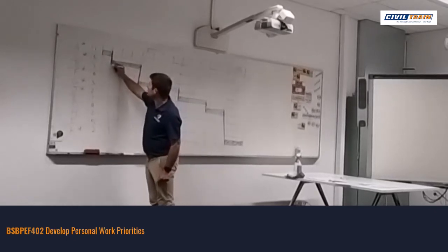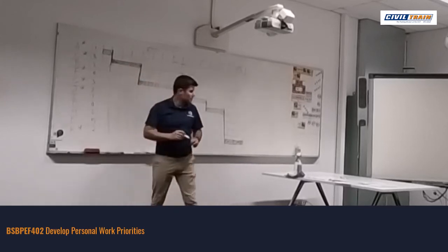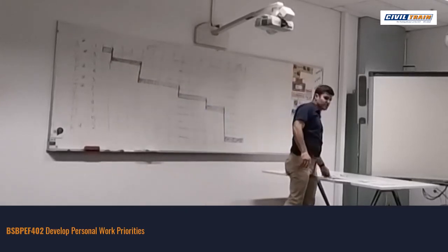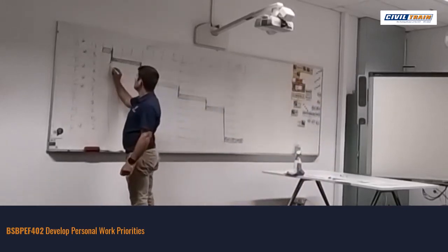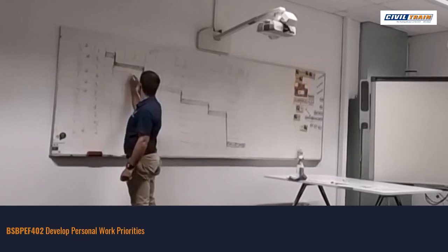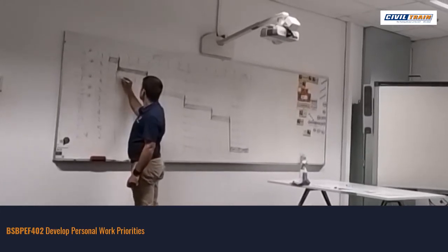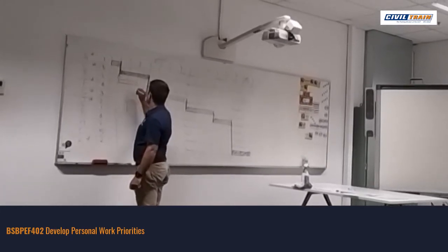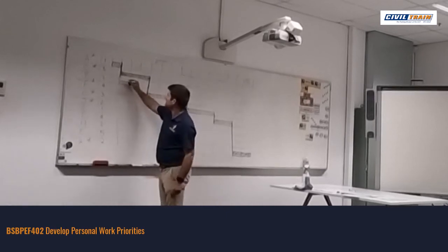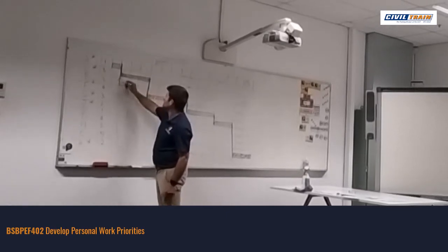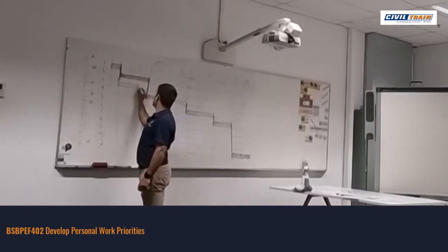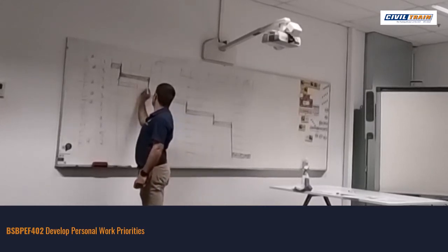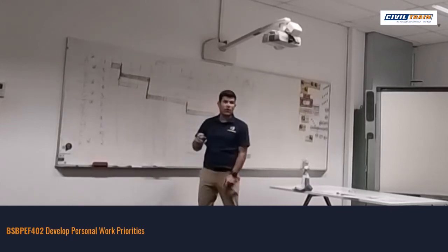So what I would do is draw an arrow. And the main difference with the floating tasks is that it's 2 days. It has to start after task A, but what I can also do is put in some dashes here until I get to that line.